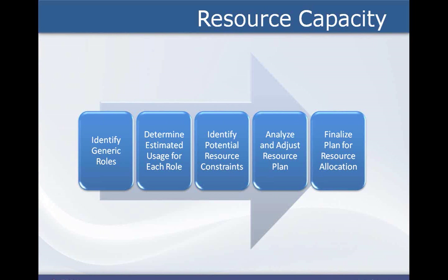This will help you establish the structure for your project and potentially how your tasks will be organized and even identify security constraints. What disciplines and skill sets are required to complete your project? Without the proper skill sets and expertise, particular tasks may require more training, longer turn times, possibly even result in rework. Effective resource management relies on the fact that these factors have all been considered prior to selecting your resources.